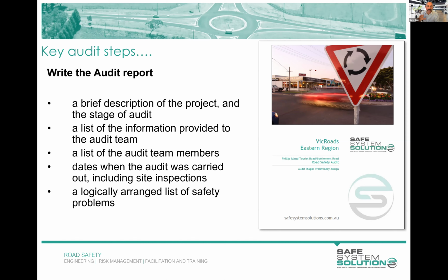The reason for this, and trust me on this, is when you find yourself in court, coroner's court or in court because there's a legal battle, and you were part of the audit team, you want to be damn sure of what you audited and have proof that if they fundamentally changed what you as a team audited, you didn't miss stuff as an audit team, it got changed. And that certainly happened on a number of occasions.